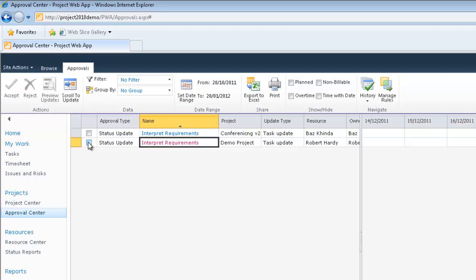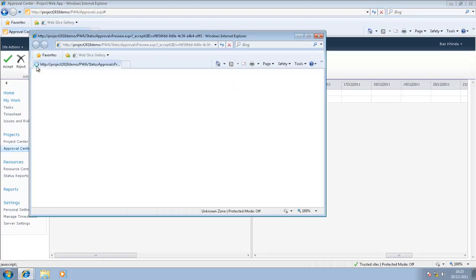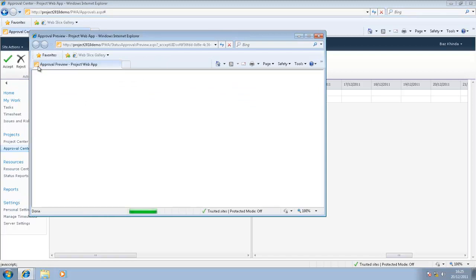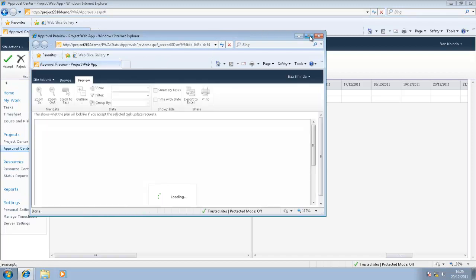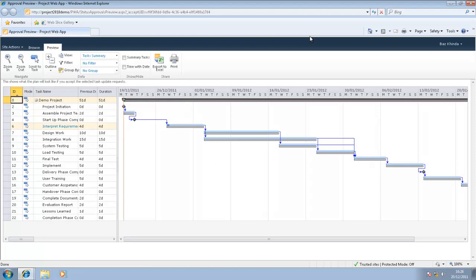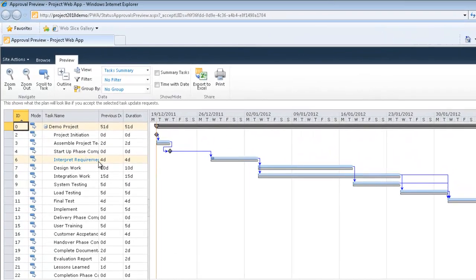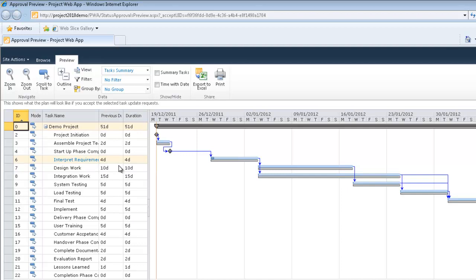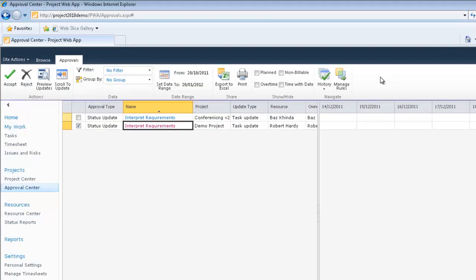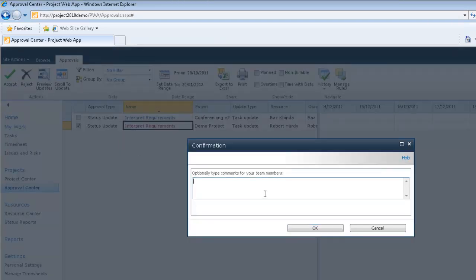What I've also got the option to do is actually select that particular update and I can preview the update prior to accepting it. This happens within Project Web App and what you'll see shortly is a Gantt chart. Here we go. This is a task that I updated on, interpret requirements, and we can see that that is highlighted in yellow because that is a change that has occurred. Thankfully, everything is still within baseline. So now I have a change in bank. I'm happy with that.